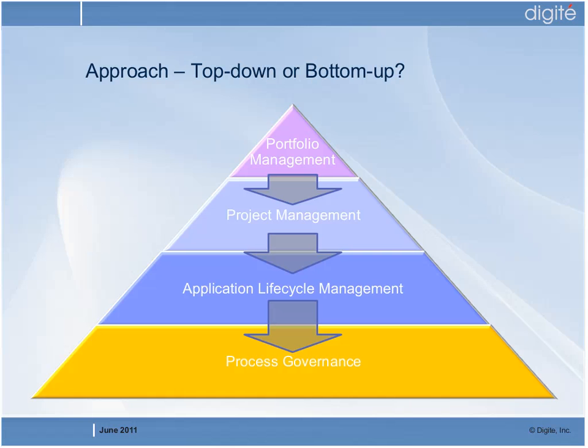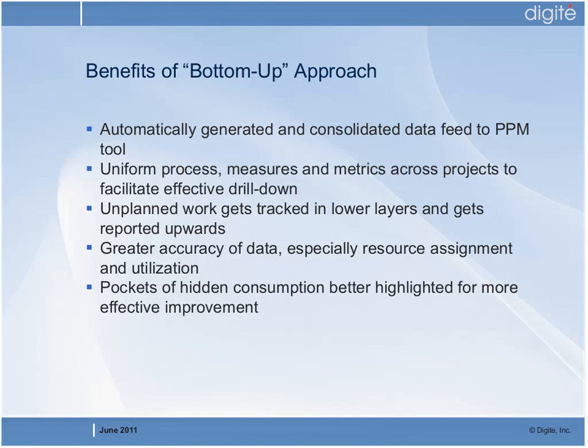The project plan will say, you know, I'm doing requirements, I'm doing design, I'm doing development, etc. But it might not have specific tasks that track maybe defect fixing or customer issue handling or project planning or meetings, etc. And some of the additional tools that you use along with the application lifecycle management do help you capture that unplanned work and therefore provide better feedback to the PPM tool or the project management tools, even to say how do you better plan your next set of projects which take into account some of the unplanned work that goes on.